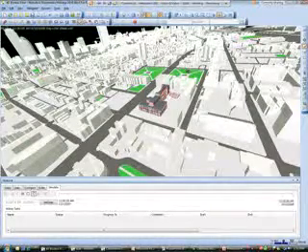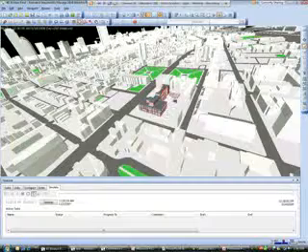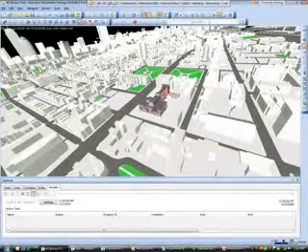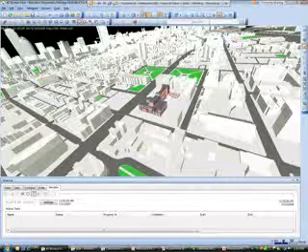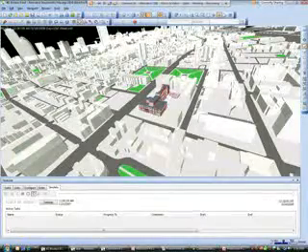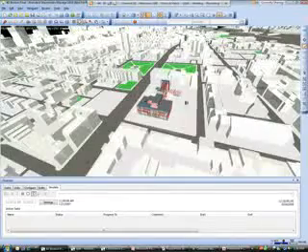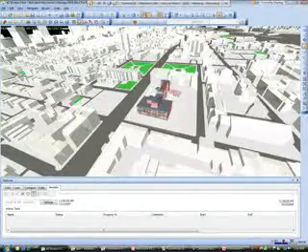beyond that. We can start planning out our logistics, the deliveries, and using a 4D aspect, we can start saying, we have some space over here on the side, we can store equipment here. Once that gets installed, then this becomes the phase 2 of this building, or it becomes the next slab that's going to get poured. We can start to identify these kinds of areas and incorporate that in our planning process. So even something that's in a tight area like this, there's still plenty of potential to go back and maximize the use of the site.